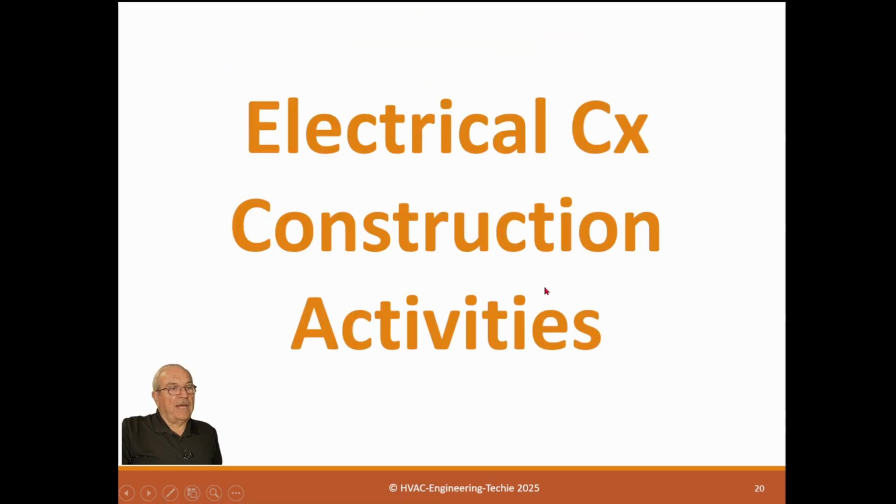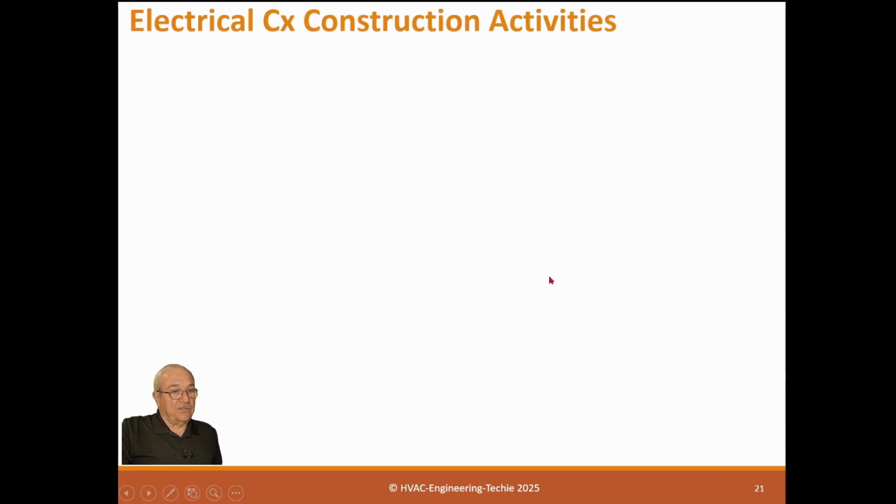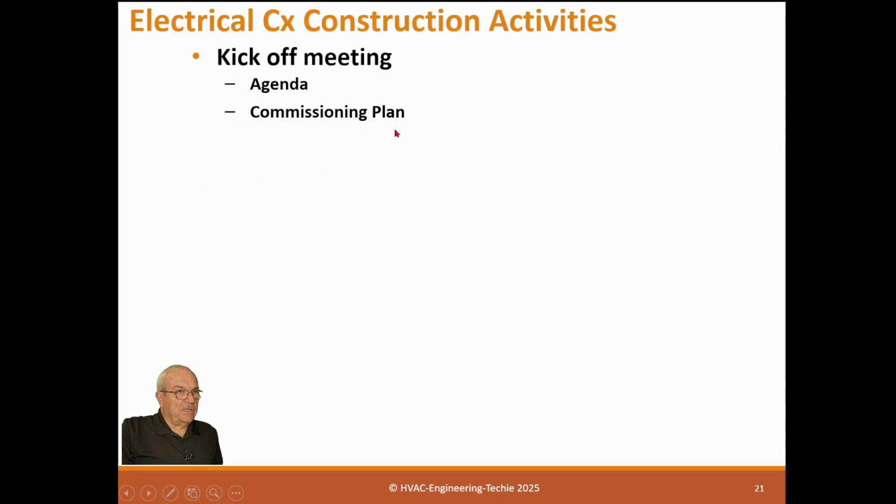So now let's look at what happens when the job actually starts. We're under construction. First of all, you have a kickoff meeting, and this is a kickoff meeting for the contractors. You produce an agenda. You have your commissioning plan, and you're going to review that. You're going to explain the submittal and shop drawing review in your kickoff meeting.